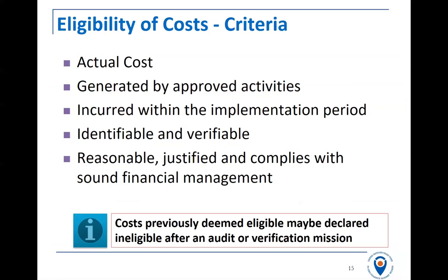Payment to staff or consultants must be supported by timesheets that have been approved or verified by the authorized officer in the organization. Similarly, advances for services which have not yet been received should not be reported in the financial report.